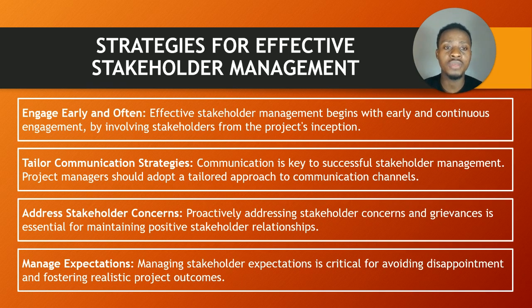Effective stakeholder management begins with early and continuous engagement, by involving stakeholders from the project's inception. If we have a project that's supposed to last one year, we cannot be engaging the stakeholders by the eighth month. It won't work. The project is almost going to be a failure. So we need to engage them as soon as we've identified a problem and want to solve it, bring on the stakeholders, and engage them early and often.